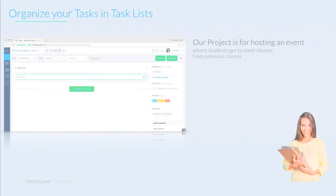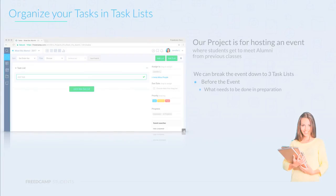We're hosting a project for an event, so a good starting point would be to create a task list for before the event, during the event, and after the event.